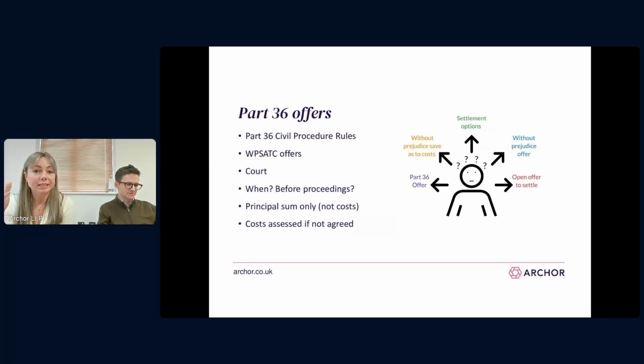So a Part 36 offer can be made in relation to monetary claims, it can be made in relation to declarations, to counterclaims, to appeals, cross appeals, and it can be served at any time, including before proceedings are actually commenced. Now, the offer must comply with the strict requirements of CPR Part 36 to be valid and to attract the specific cost consequences provided under these rules.